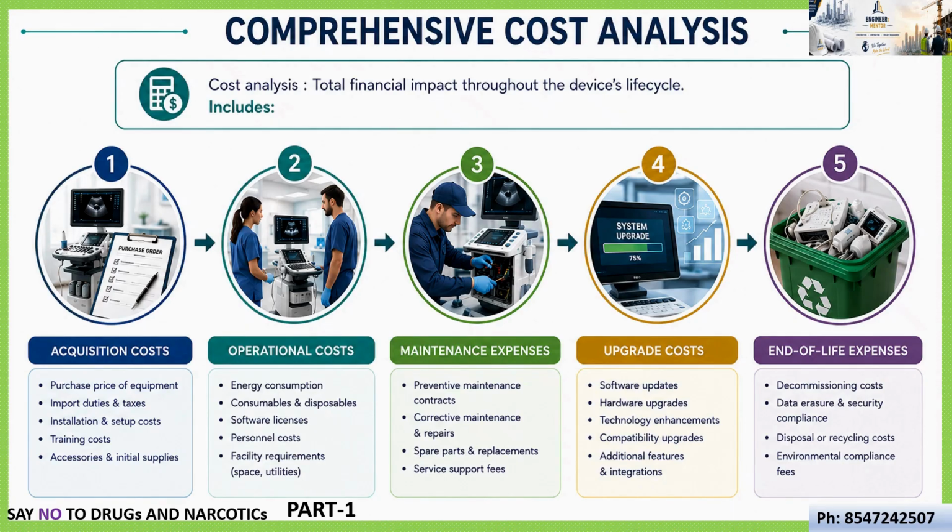Just want to add one more thing in my experience. Most of the equipment have defect liability, DLP, and maintenance. It is segregated with a narrow line. Supplier will give defect liability for their equipment. For example, suppose one supplier gives a CT scan, so it includes a printer also. Just to understand, I'm taking the printer. The printer DLP is valid only if maintenance is properly done. For CT scan also, it is the same condition. They will write at the bottom, DLP for 10 years is valid only if the equipment is maintained properly.